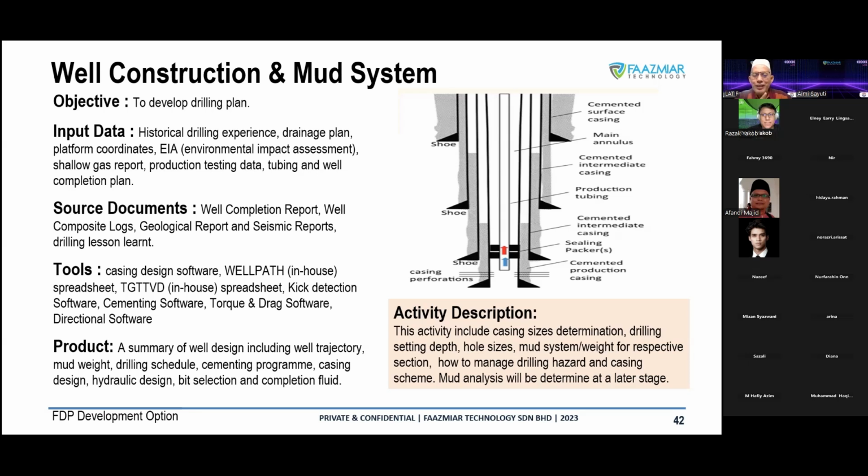So we can say if one day we can save, we can hire a tool that we pay for 300,000. This is the comparison. So we always consider high technology in our offshore drilling because our operating cost is high. So the moment you can say one day, actually it can pay off, whether it's your system, your mud system, and so on. Okay, interesting.